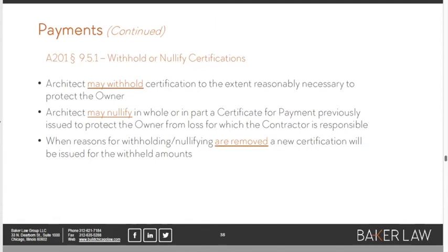The architect nullifies the pay app from 2 months ago, GC repours the slab, test comes in good. 2-3 months from now, after the losses are kind of adjusted, then the architect reissues a new certification for whatever the contractor has already been paid.